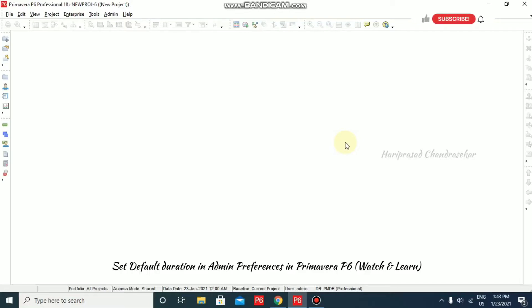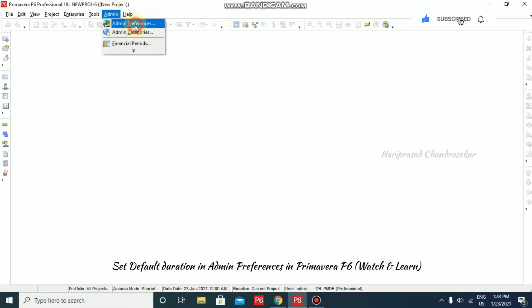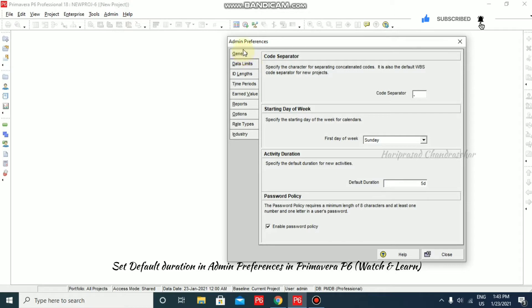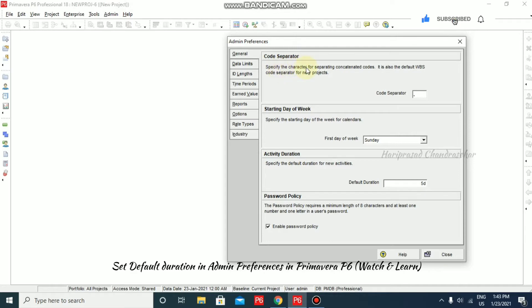Now we will see admin preferences in Primavera P6. Going to Admin > Admin Preferences, we have the General tab first. In General, we have a code separator — this specifies the character for separating concatenated codes. It is also the default WBS code separator for new projects. By default, the code separator is a dot.